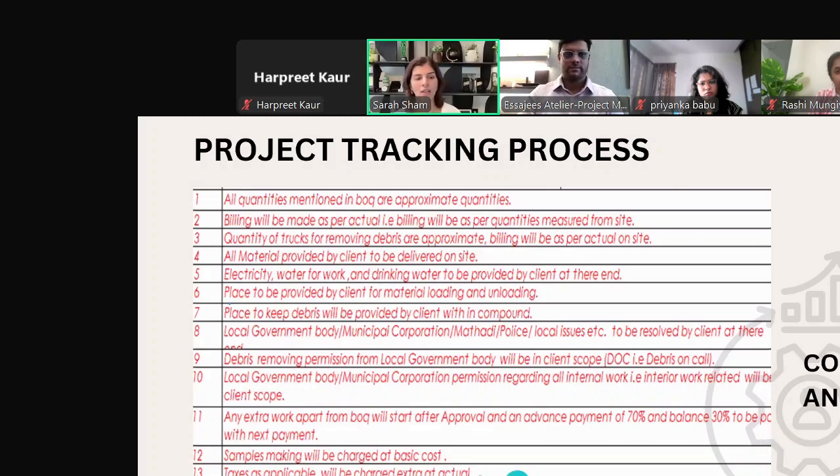Samples. So, what we've started doing now for point number 12 is we are starting to spec in our BOQs all the items which we need sampling for and asking them to include the sampling cost within that BOQ so that the sampling cost doesn't become a huge topic and something very difficult. Yeah, there are two ways. We can do it individually also, and also we can include that in quantity rate. Then after that, pest control, taxes.